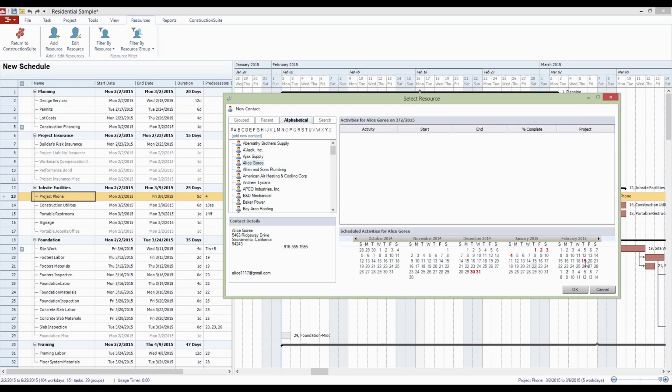So if we're looking to schedule tasks, I want to make sure that I don't double up on these things. Conveniently, for the date that this task is supposed to start, I have nothing on my activities list, nor when I check the calendar do I see anything down here on the listing either, so she should be okay to actually use on this particular task without causing any kind of a resource conflict.